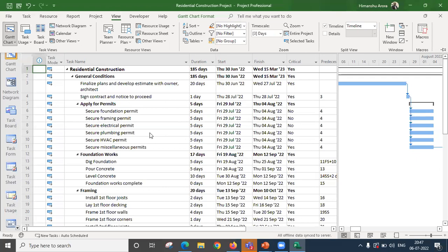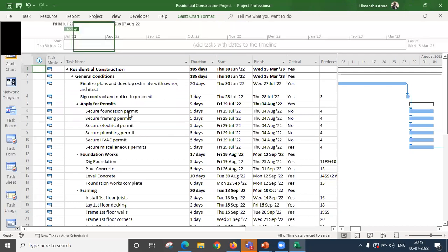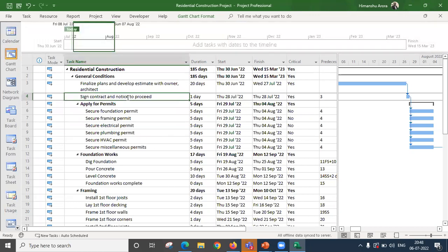So in the top-down approach, estimation is done at the topmost level, and then the entire project is broken down into the sub-activities or the activities level. In the bottom-up approach, the estimation is done at the activities level, and then it goes up to the work package level and to the project level. As I mentioned, the structure that we'll get is this structure.